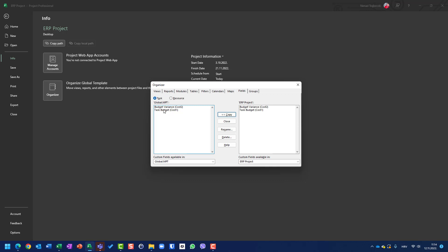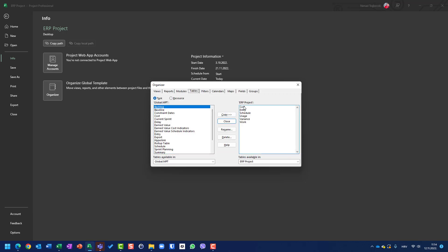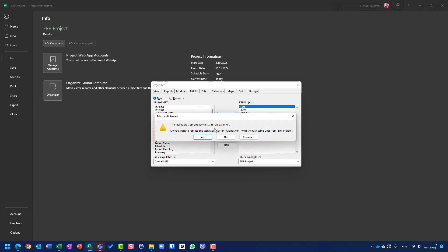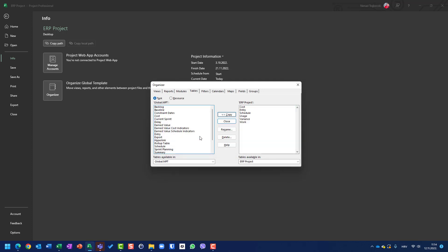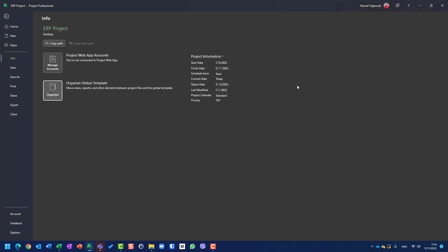Now I also want to copy the cost table, because those two fields are applied to the cost table in the current project. I will use Copy as well. And it says: you already have a cost table — do you want to replace it? And I will say yes, I want to replace it. Now I will close the whole thing.